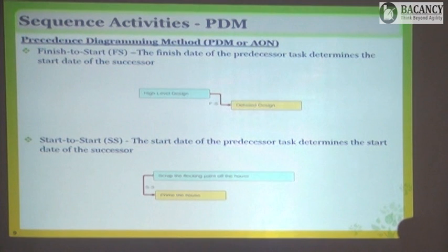We have a dependency. So this is called finish to finish. Is it fine? Sir, is it clear? Like when you have to do a delivery. Before the final delivery, you will say that okay, our testing must complete and our documentation also must complete at the same time. Then only we can go to the next activity, which is to kickstart the handover process. This is written as FF, finish to finish.